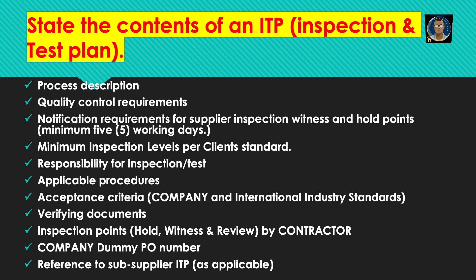State the contents of an ITP — Inspection and Test Plan. Process description, quality control requirements, notification requirement for supplier inspection, witness hold points with minimum 5 working days notice, minimum inspection level per client standard, responsibility for inspection or test, applicable procedure, acceptance criteria, company and international industrial standards, verifying documents, inspection points, and hold/witness/review by contractor and company.